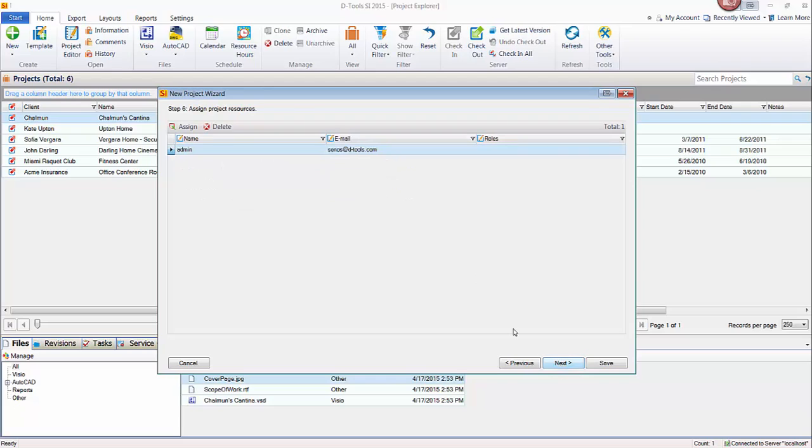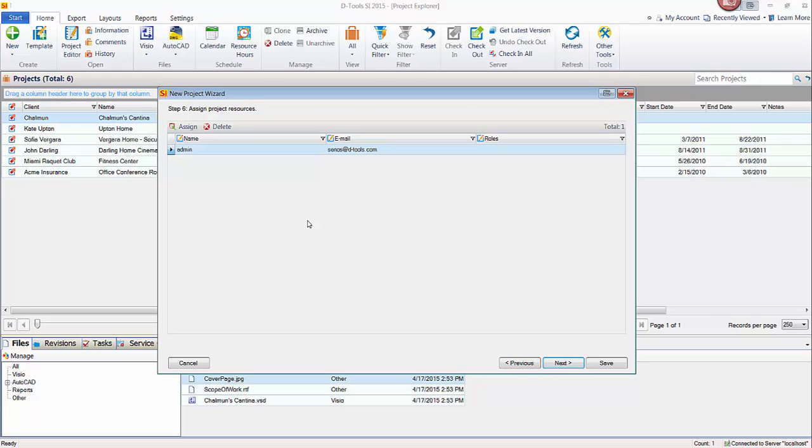The next step here is who the project resources are. And it always defaults to whoever's logged in at this point in time. Here you could just add if there's an engineer that's going to be working with the salesperson on this job or you know who the project manager is going to be. You don't have to do anything at this point with this step if you don't want to. The primary use of resources really is later on when you're using our scheduling features for tasks and service orders. That's when you would add some resources here like the installers or the technicians that you want to assign to those tasks.